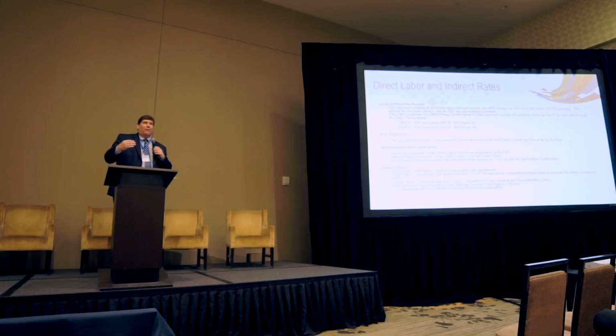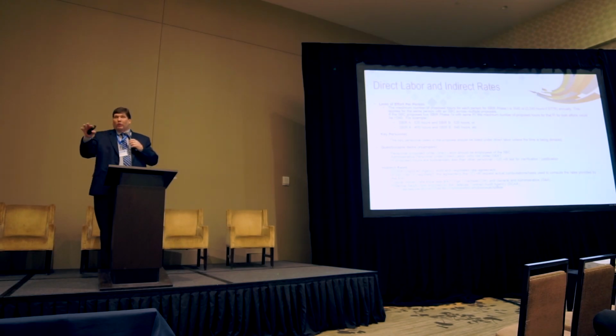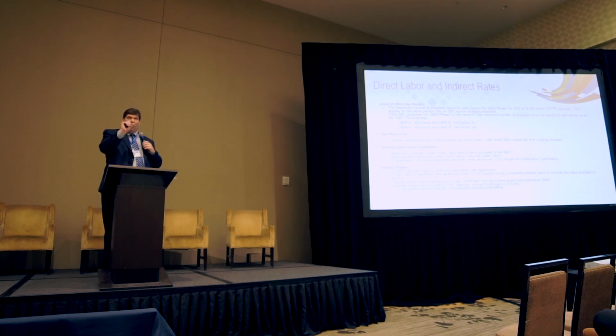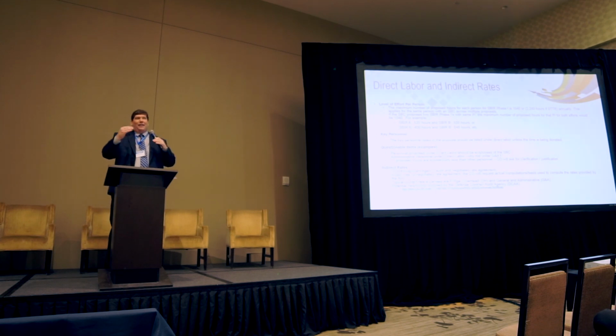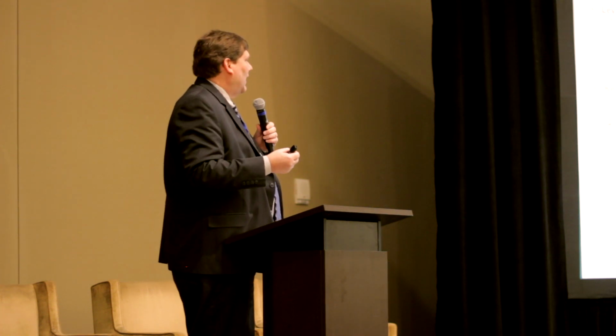This is key if you also propose multiple proposals, and if you get selected for multiple contracts and have one employee or a couple of employees that are throughout all of the contracts combined, they shouldn't go over that 1,040, just to be realistic. The direct labor should include, again, all of your firm's employees, most especially your key personnel.